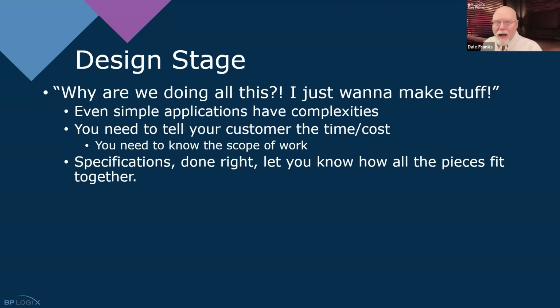Also, I need to know how many form fields there are, and what type of form fields, how many forms there are, how many business rules, process timeline, how many activities, what type of activities. At some point, I've got to tell the customer what the scope of the work is going to be. Now, of course, most of the time internally, the cost is not an option. The customer is more concerned about a due date. When can you get this done? But that's not universally true.